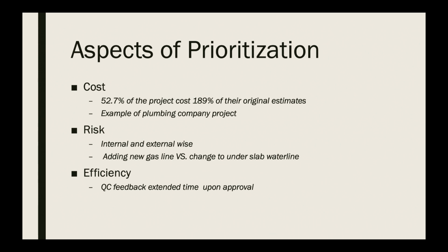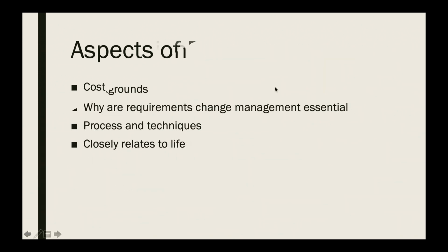One example is in the plumbing software project. A new requirement was added: work feedback deadlines are no longer automatically extended. Supervisors who need longer times need to ask for permission for extending first. In this case, only supervisors who have special needs will be given a longer time on providing feedback, instead of everybody upon approval, to avoid unnecessary time wasted and also decrease the money put in for extra working time.